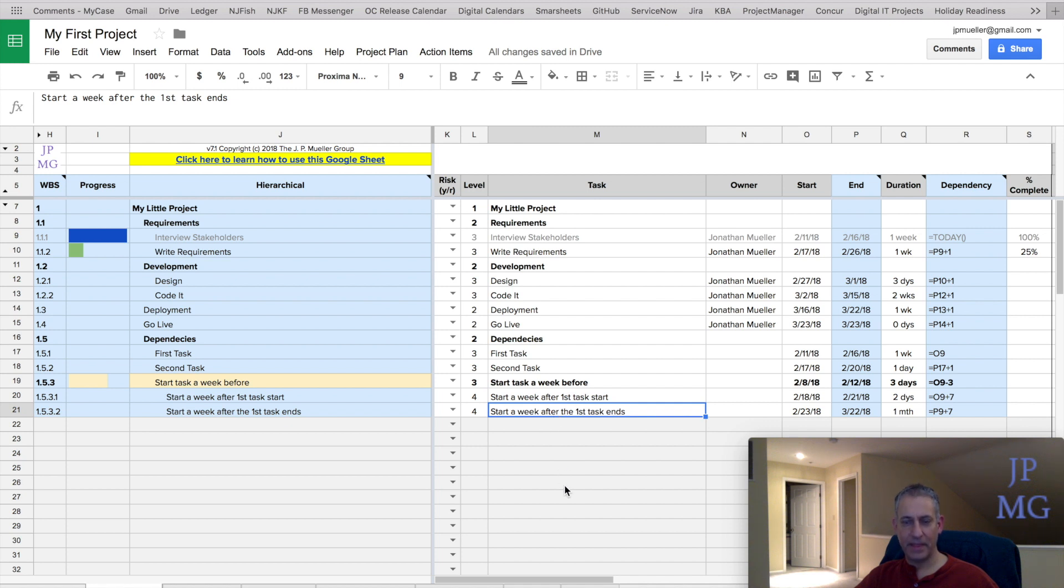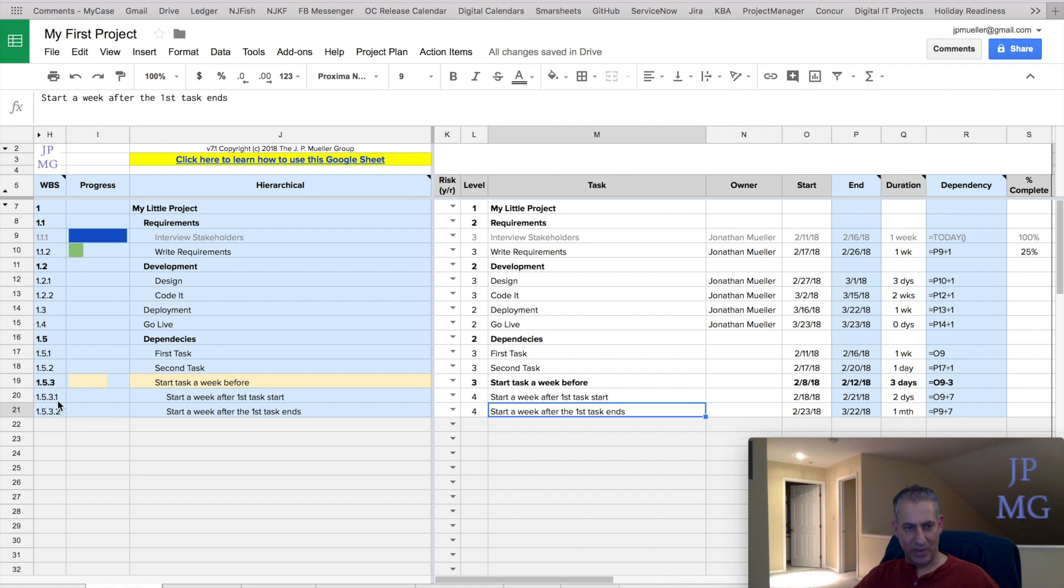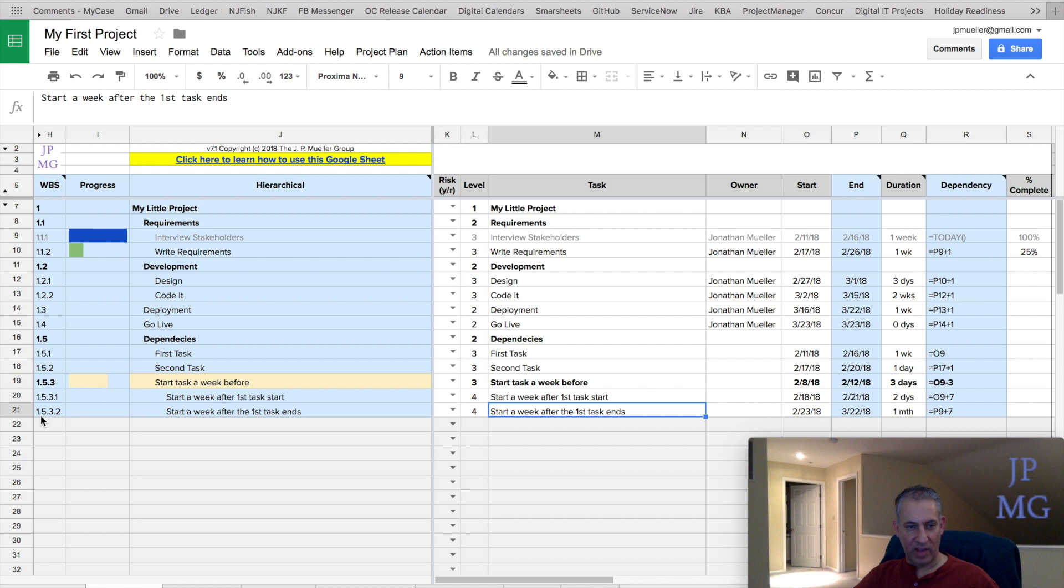And that simply is how you indent. Notice also that it makes the work breakdown structure indented as well, or adds a dot to it. So this went from 1.5.4 to 1.5.3.1, and this went from 1.5.5 to 1.5.3.2.